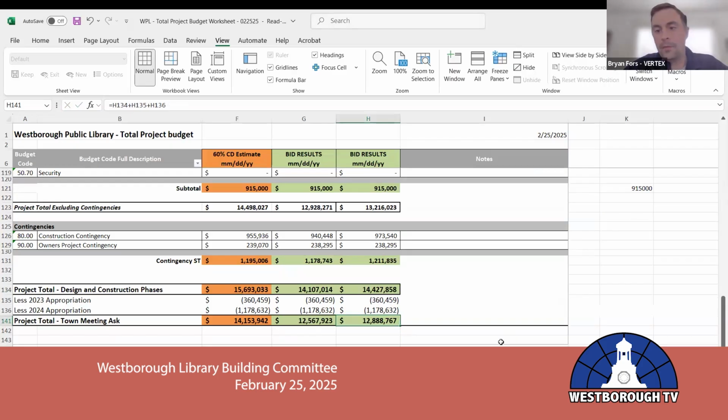It is my opinion that, in leading up with our estimates, we were holding a 10% contingency. I think even with our favorable bids, there shouldn't be a reason for us to cut the contingency that we have. Specifically on a renovation project such as this, there still could be a lot of unknowns found, old skeletons in the closet that we're going to need to identify and take care of. So I felt it appropriate to maintain the construction contingency that we have, which yields a higher percentage but keeps the same amount for construction.